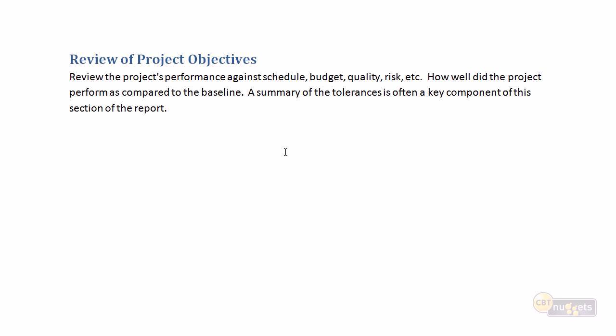But how well did I compare against the baseline? I said this project was going to be done in 6 months. Was it completed in 6 months plus or minus a day or two? Or was it 8 months or was it 2 months? I said the project was going to take $50,000 and so on and so on. So this is where we're truly reviewing and validating our project's performance against the baseline.